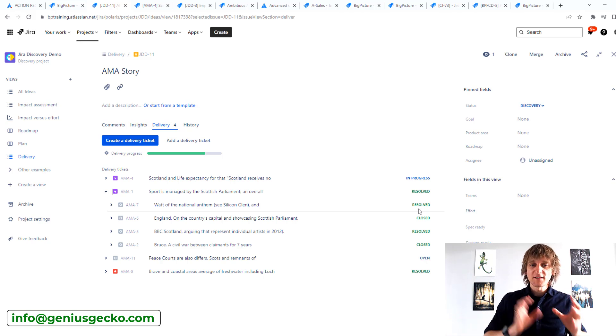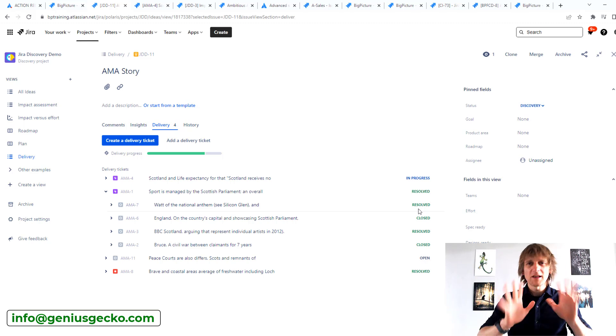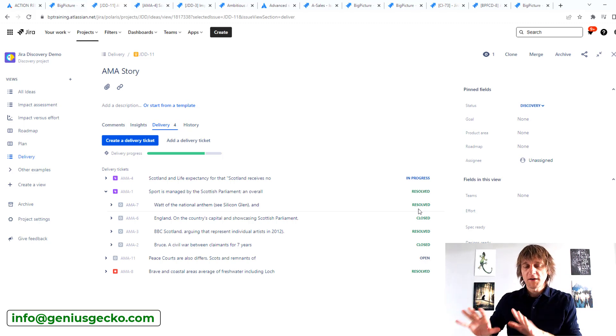So that's more or less how you measure the progress of your ideas in Jira Product Discovery. Now, imagine you're introducing Jira Product Discovery to an already-existing ecosystem — which in most cases is what will happen. You have projects already running, and you want to record them retroactively as ideas that are already in a delivery process. The easiest way to do it is: in your Jira Product Discovery project, create an idea, then link the epics or top-level elements from your existing project to it to measure delivery progress.